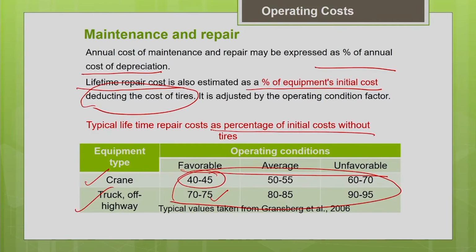It will be used in an intermittent way. The crane is used intermittently when compared to the truck. That is why you can see the repair factor is less, but in the truck the repair factor is high.